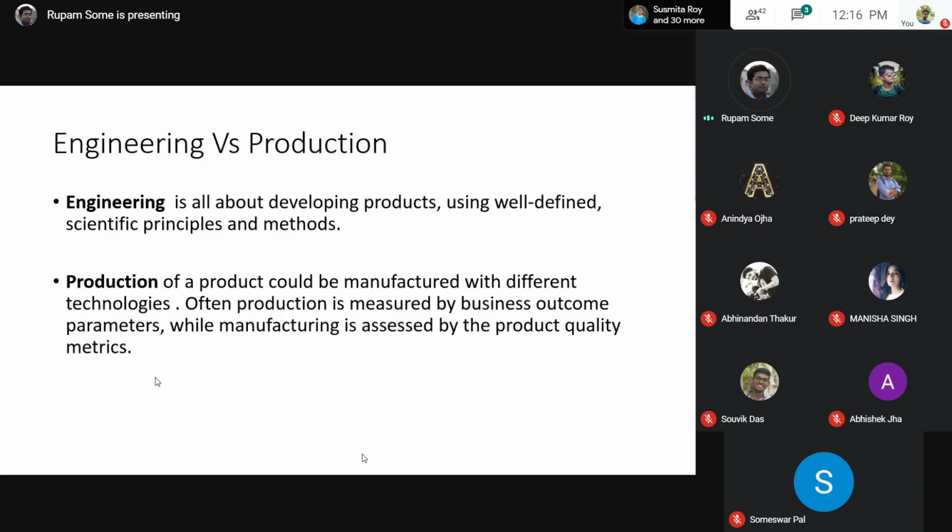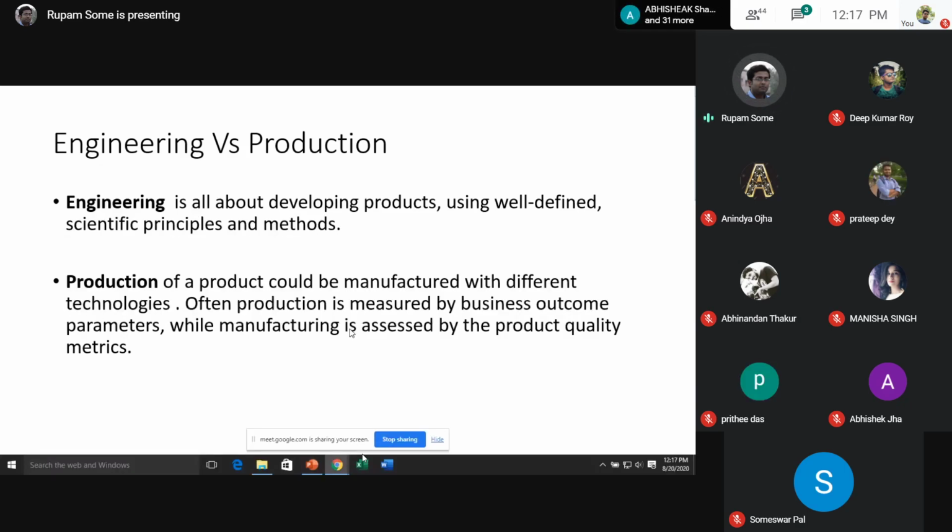Let me give you an example. Suppose that you are about to launch a product for a particular country, where the average annual income of the people is not more than 10,000 rupees. So in that country, if you deliberately consider the cost of the project to be more than 1 lakh rupees, then nobody is going to buy it. That is a kind of feasibility analysis.